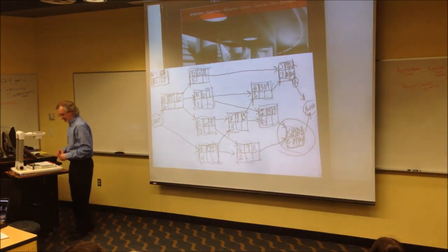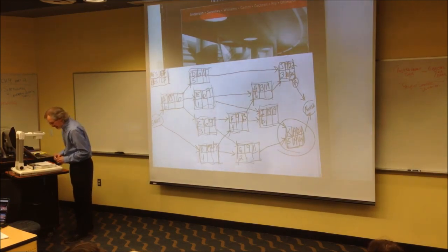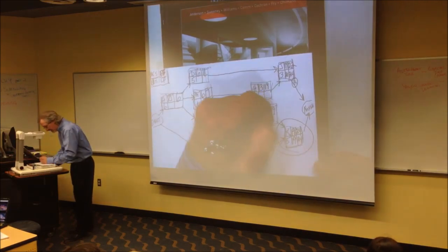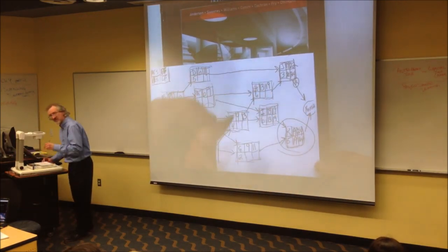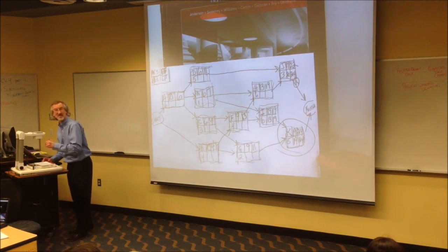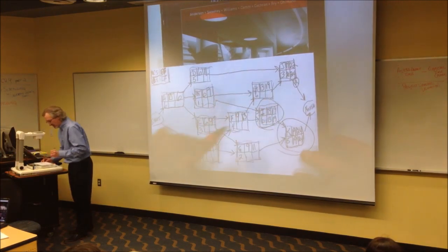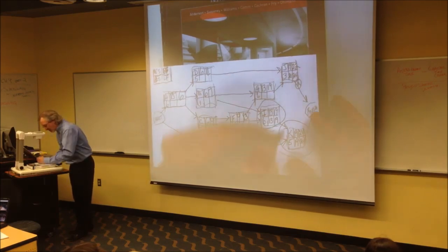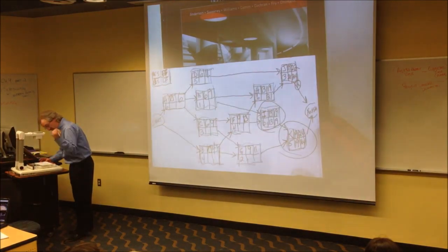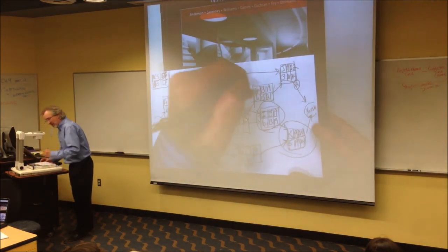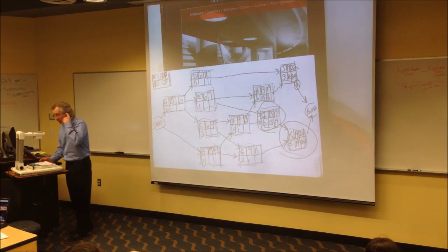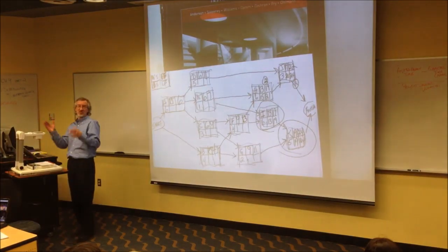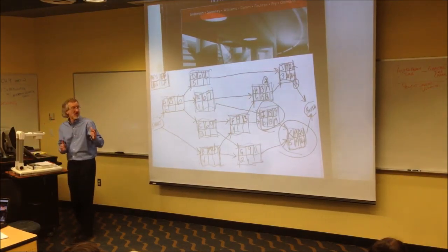All right. Let's go with I. I has just K after it, so latest finish would be 19. Subtract 6 is 13. Slack would be 0 because it's a critical activity, circle it. H. H only has J after it, so its latest finish could be 21 minus 6, 15. Critical activity? No, so it has slack of 2. The difference between either the finishes or the starts, for those that were absent.